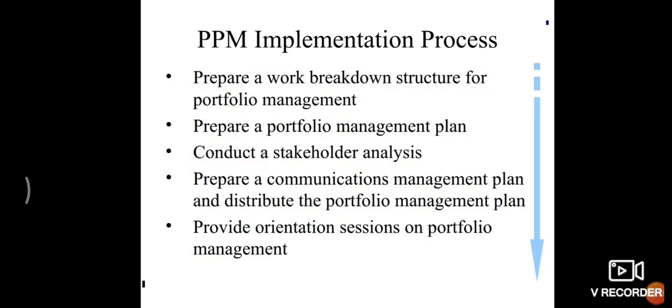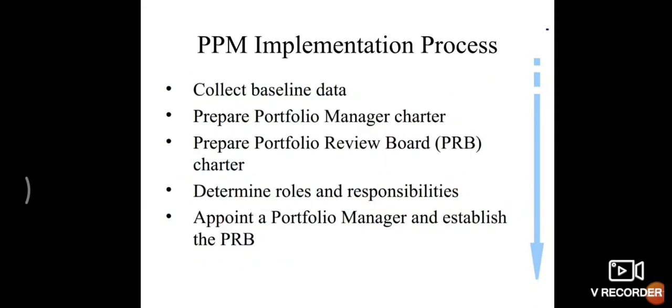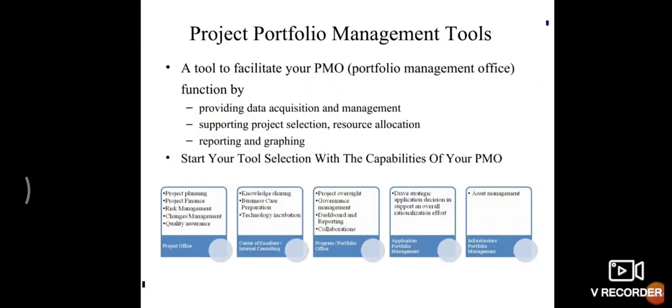Prepare the portfolio management plan, conduct a stakeholder analysis, provide an orientation session on portfolio management, and all such things. Then we collect the baseline, where we prepare a portfolio review board and determine the roles and responsibilities of each and every member involved in the project, and such things. Then we have tools of portfolio management.